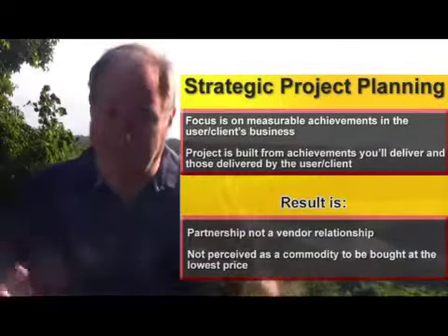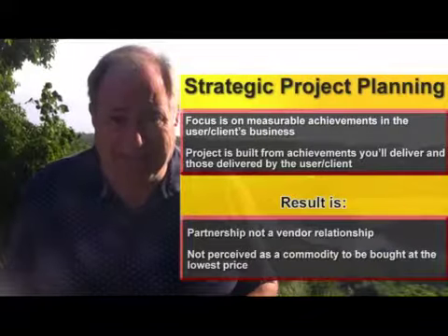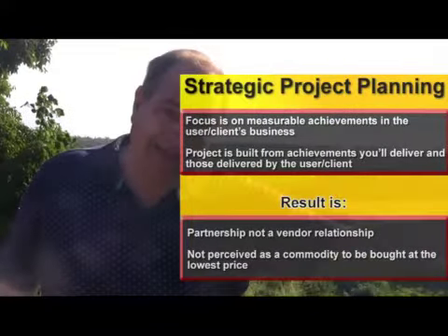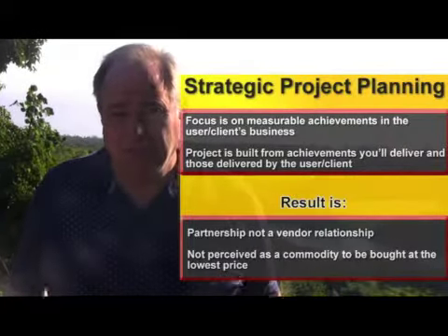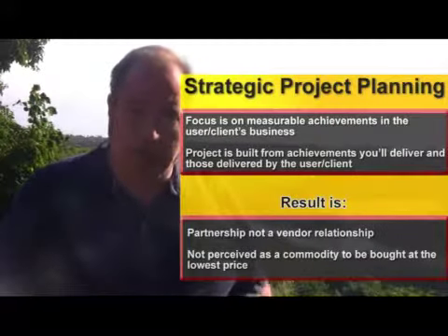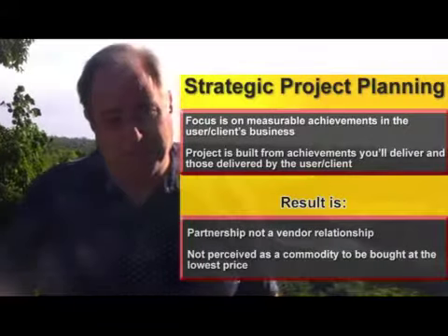And of course, the value here is if I can identify that 500 units a day will relieve this operations VP's performance pressures, then I can design the whole project to focus on delivering 500 units a day.